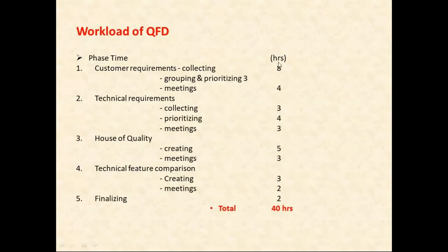The first step for me is customer requirements. I have to collect the customer requirements, group them, and conduct the meetings and finalize how much weightage each has. So for collecting the parameters, it may take 8 hours.